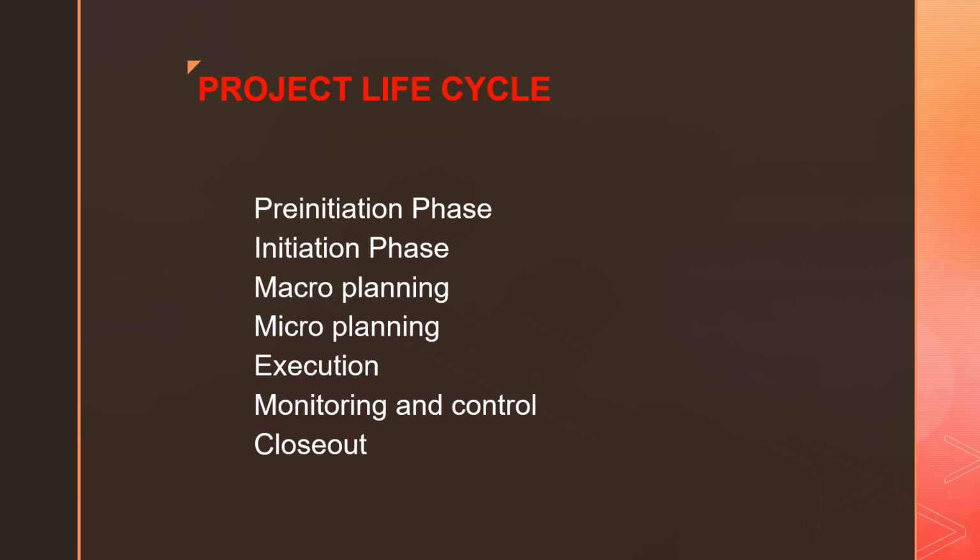Now, the next phase is the initiation phase. The initiation phase is when the clock starts ticking. That is, from the day we are in the initiation phase, we are starting the project. The input for the initiation phase is a DPR, detailed project report, and the output is a project charter. So we will be ready with a project charter by the end of the initiation phase. The project charter is a foundation to build a project.